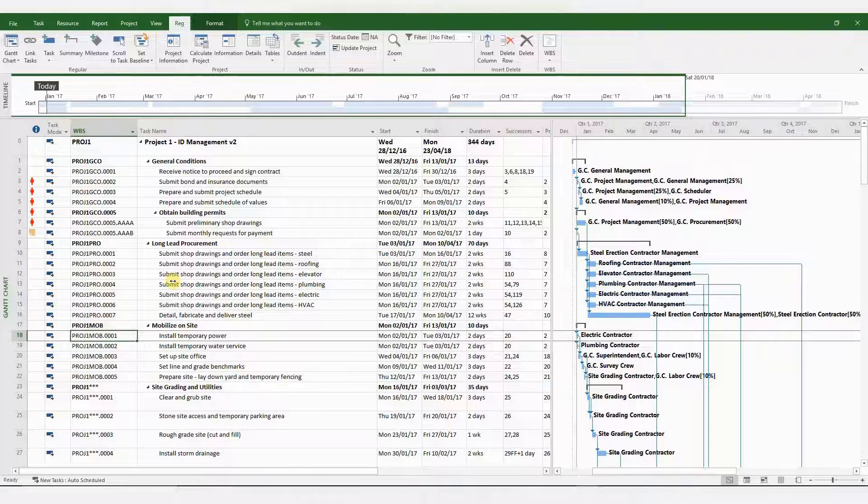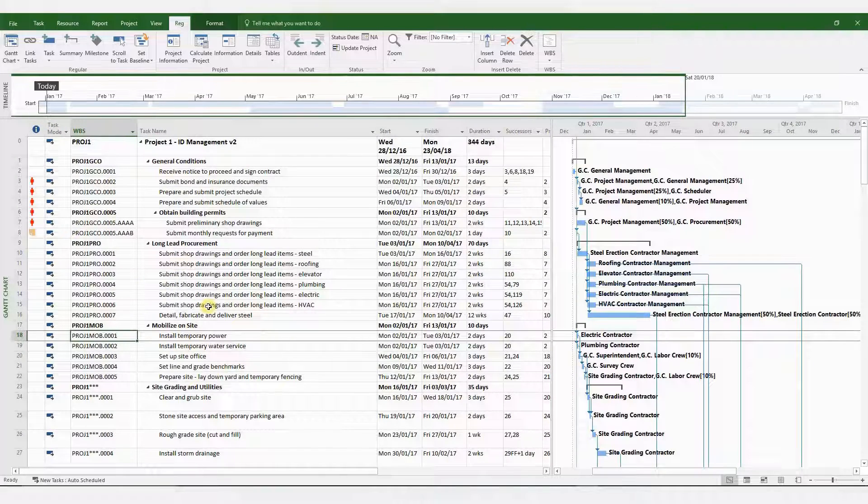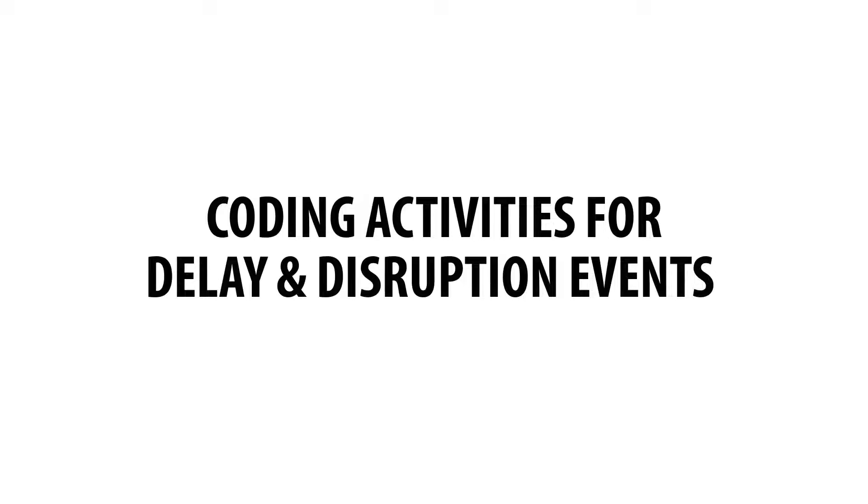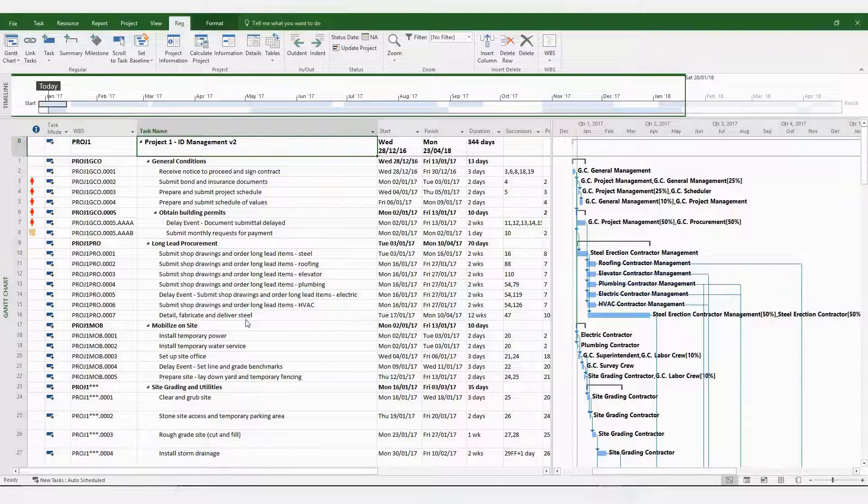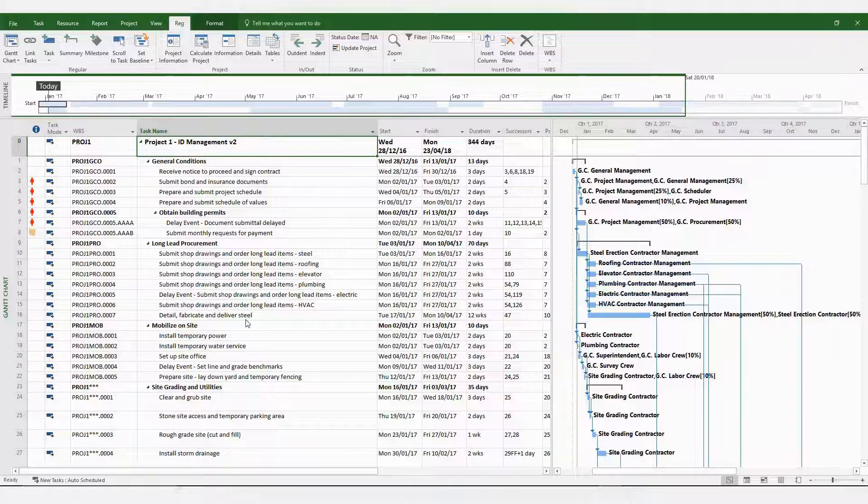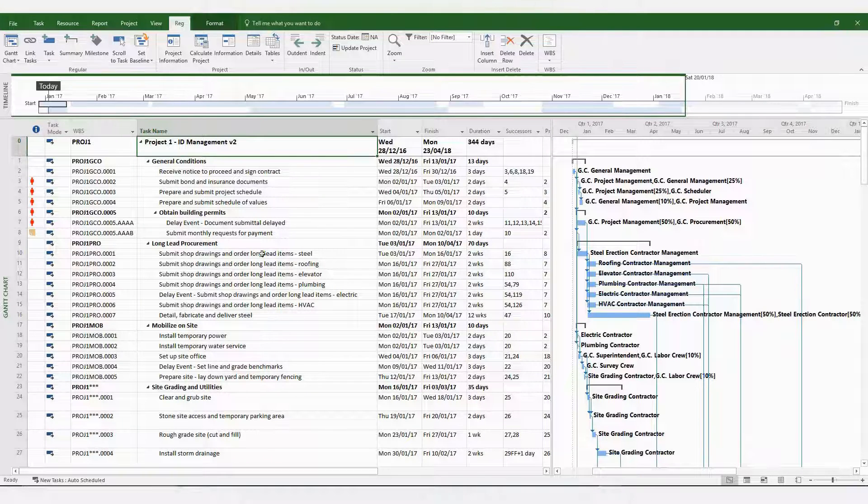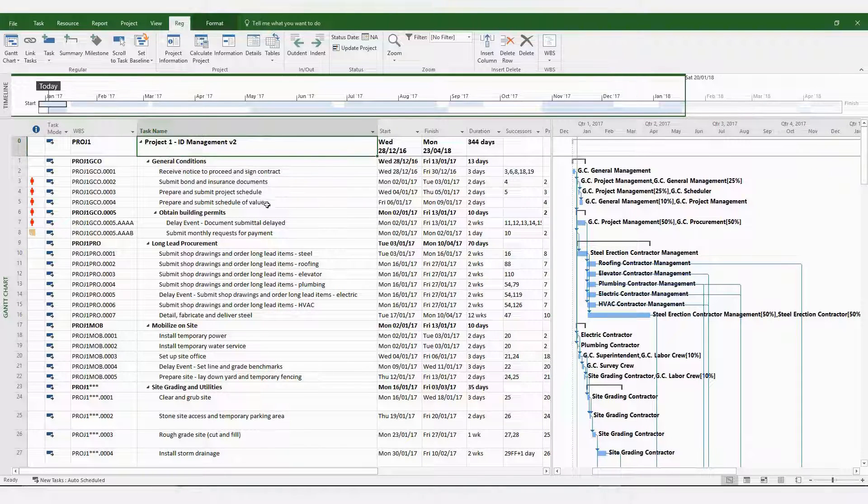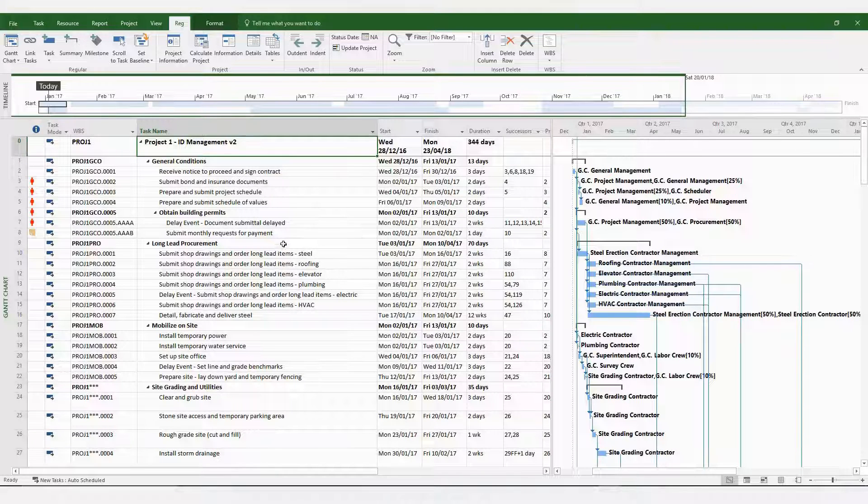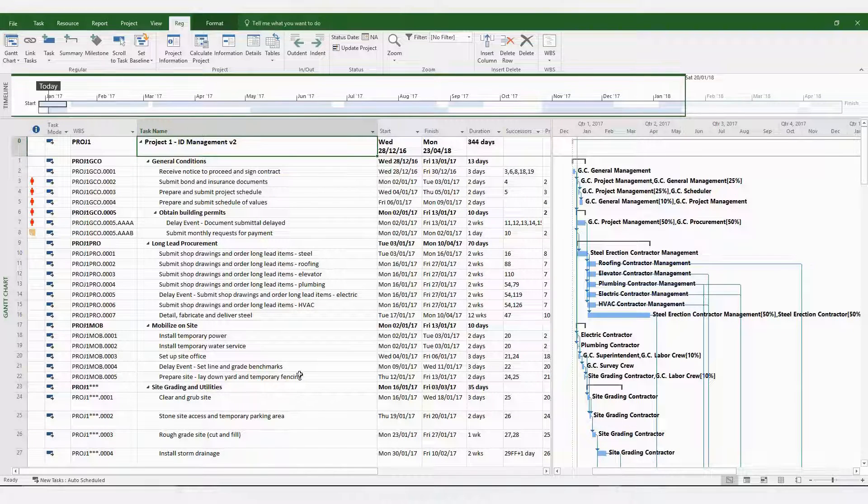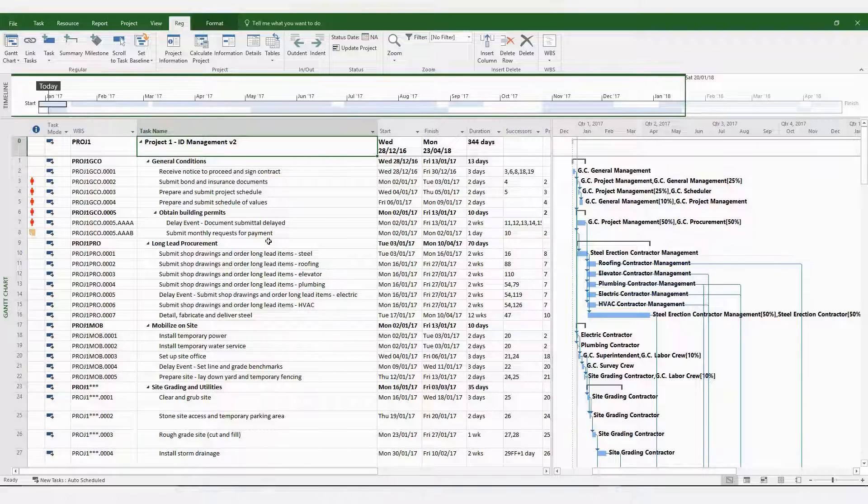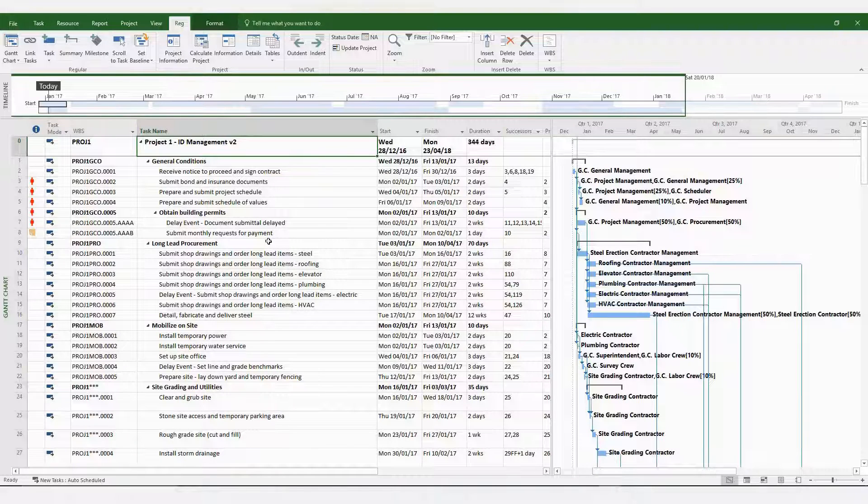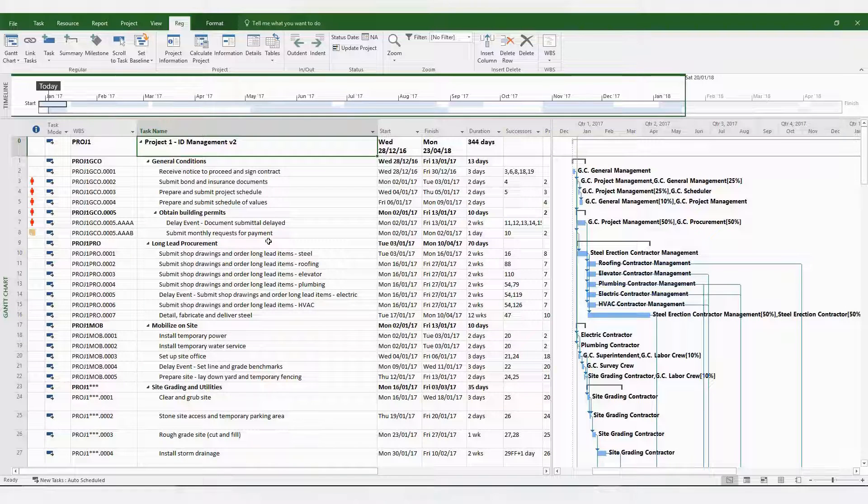So this is a method to be used to define your own WBS codes for your program. Coding activities for delay and disruption events. It is generally good practice to insert a custom field for coding delay or disruptive events. Now there are several ways to do this. You could have a lot of delay or disruptive events hidden within your task names. This is a method that I use to keep everything organized.